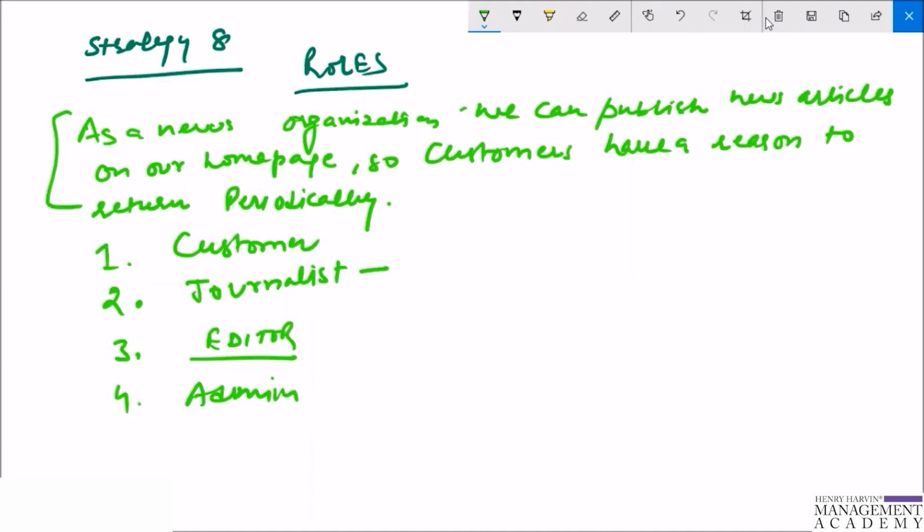It also helps the product owner to prioritize, and some roles may be less relevant at the moment and can be implemented later. Perhaps there is no need at this time for an editor, or an editor can be called by a journalist to check the article manually.